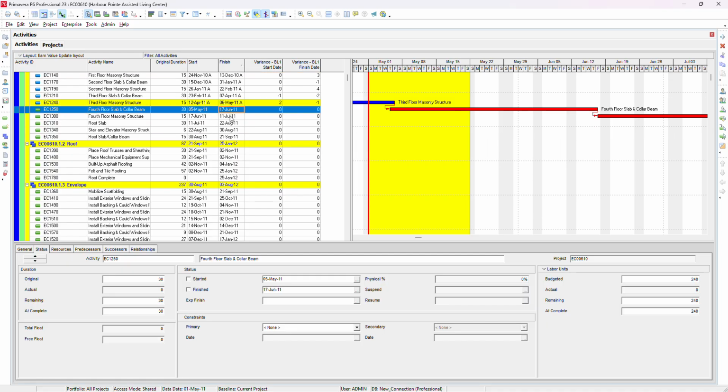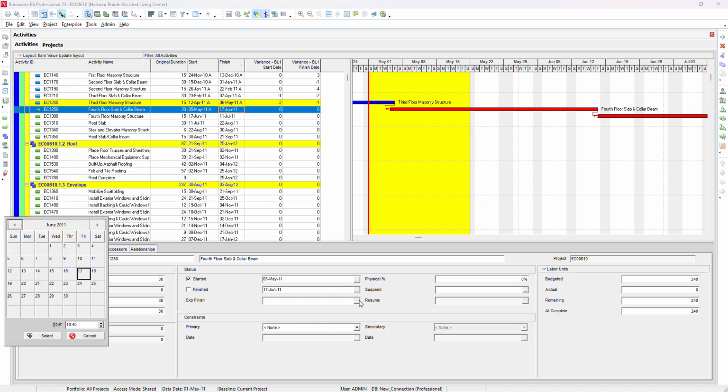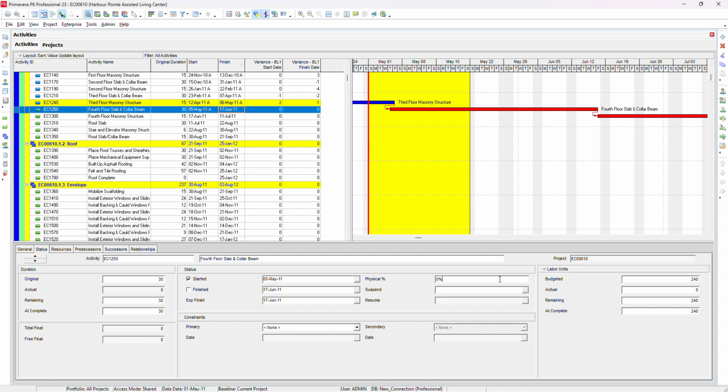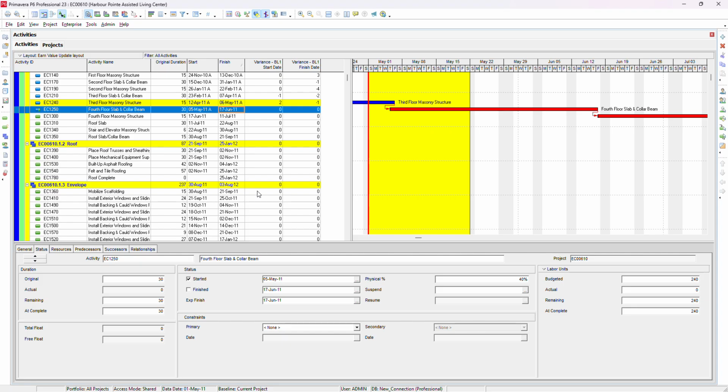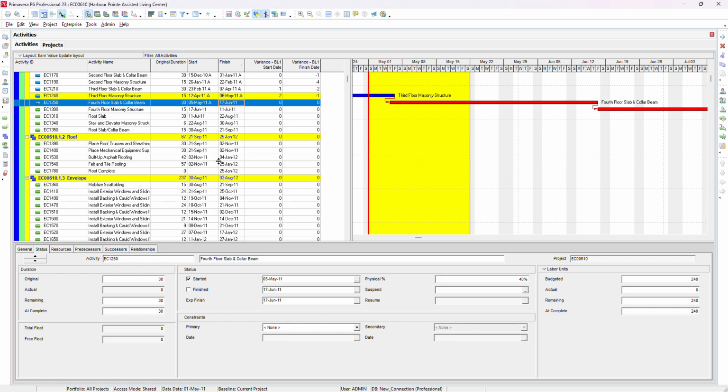If you go, this one needs to be updated. It's May 5, and we are going to 21. So I'll finish it to 17th July and I will write here 40% is complete. You need to put expected finish to hold the date, which I have shown in my previous video about it.